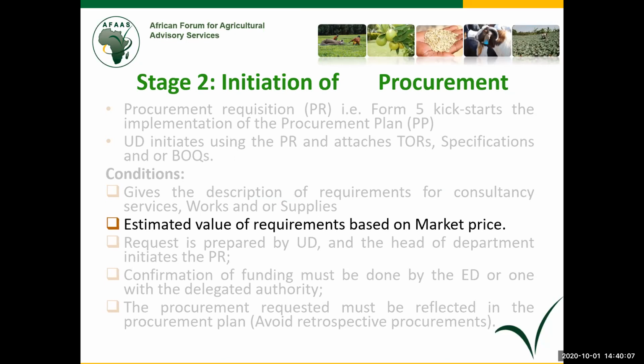If we started operating electronic systems and you had done a software for procurement, and they approved the requisition with, say, $2,000, and now you want to buy something of $3,000, the system will not accept.